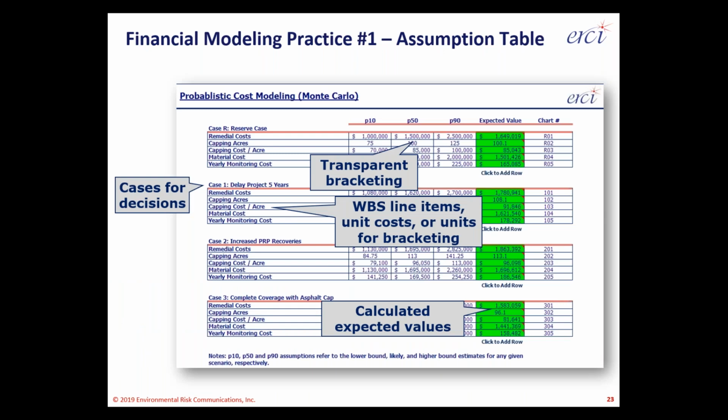If you do have a higher cost site, again, over the $1 or $2 million mark, you'll probably find value in completing a step called Monte Carlo modeling or financial modeling, where you use Excel to its more extreme capabilities in random number generation and scenario or case analysis to identify the range of cost outcomes rather than generating a single outcome for an expected value.